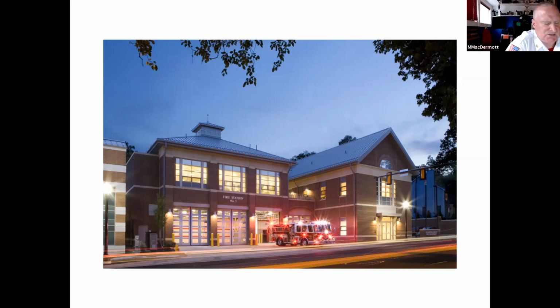The 25% contingency that we're adding, from 450 a square foot to 600 a square foot, does that quarter fill those other two buckets, the soft costs and the contingency? Oh, potentially it could. I don't know if we're ever going to see 450 again, though. Even if it was 500, that's still four-fifths of the cost. That other fifth might be able to fill those other two, the soft costs and the contingency. That might buy us that space. Because what I'm looking at is just for the cost at 600 a square foot, you're talking almost $15 million without those other two, the contingency and the soft costs sitting there.